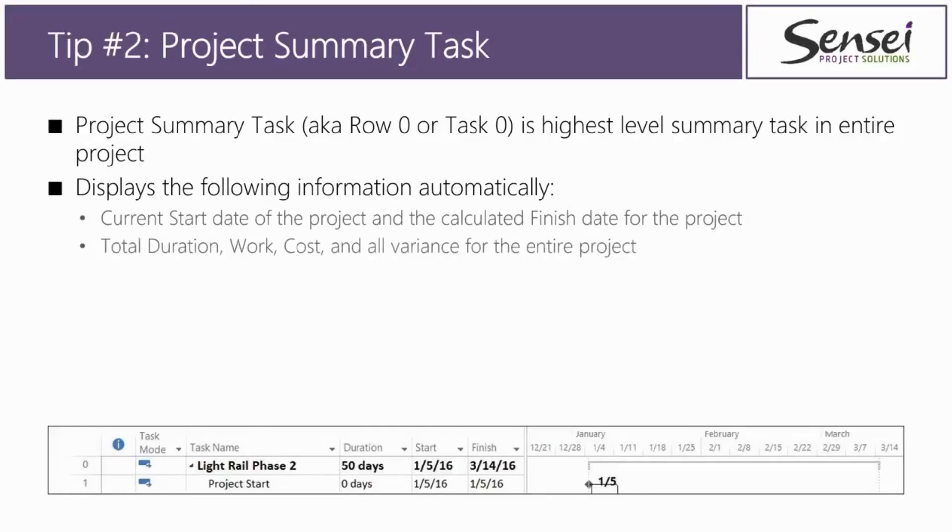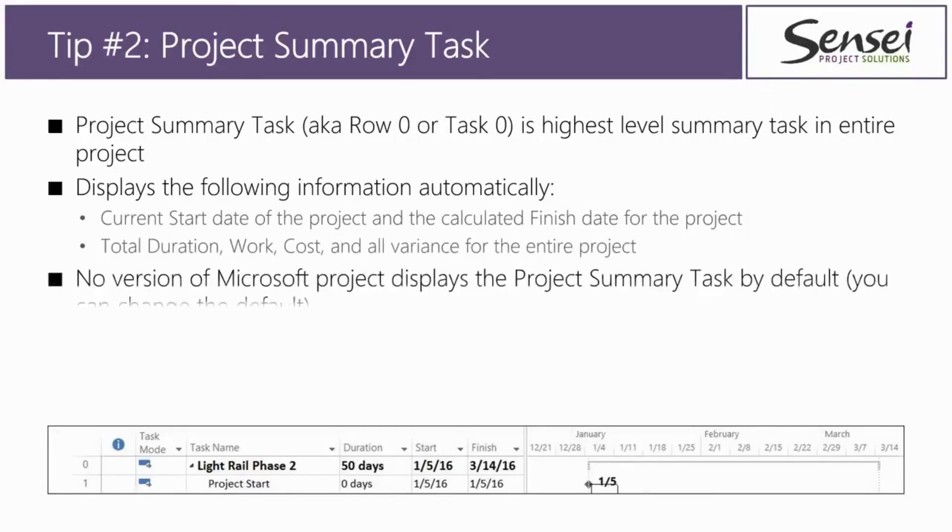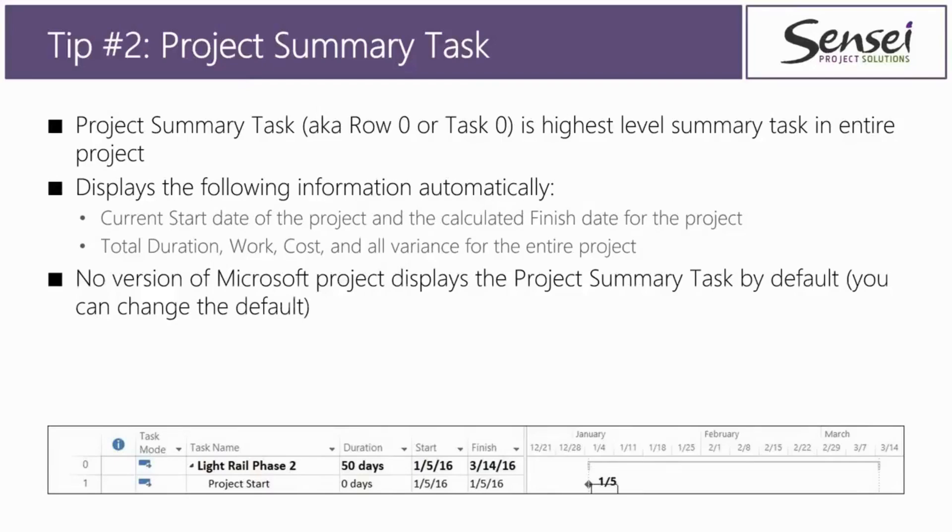You also can see on this project summary task the total duration, work, cost, and all variances for the entire project. You can actually see if the project is going late and over budget on work and cost. It's going to be very easy. No version of Microsoft project, including the 2013 version, displays the project summary task by default.